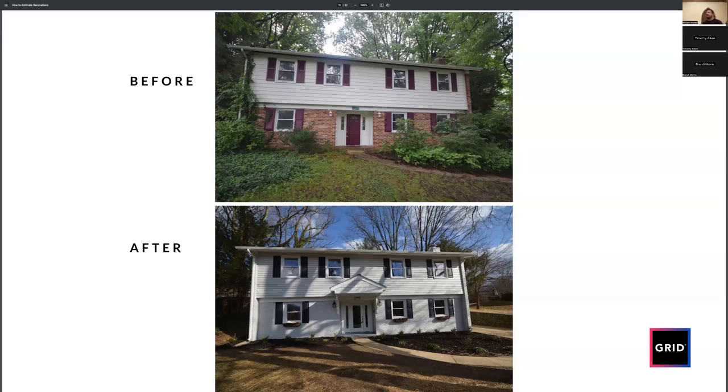Whatever your contractor tells you, add to it, right? I usually add 15% to my contractor's bid. That's about the number I go with. It can be less, sure, but that's just what your contractor is going to do. So I recommend if you have a contractor, even though they seem great and they tell you it's a $100,000 bid, your budget is $115,000 immediately, right? Just start there. And that's what you're going to tell your bank as well, right? This comes in with the financing part.